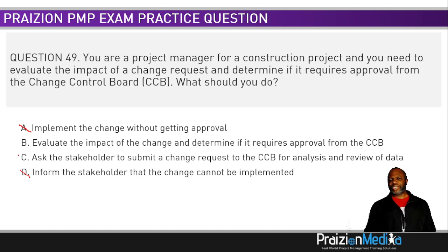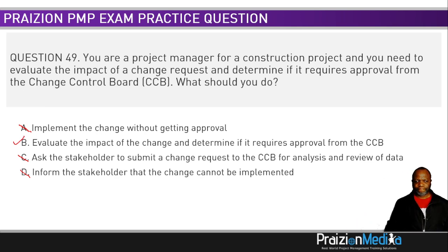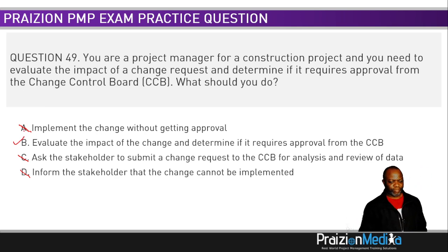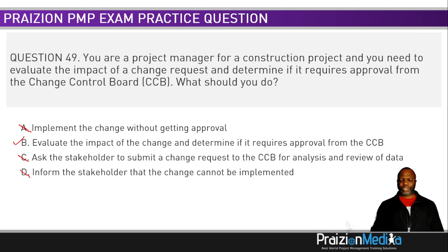Evaluate the impact of the change and determine if it requires approval from the CCB. This has got to be the better one, because if it doesn't need CCB approval, you know it's a waste of time telling them to review it. You have the power to do that.